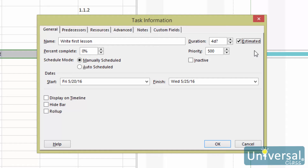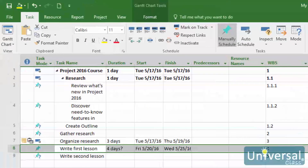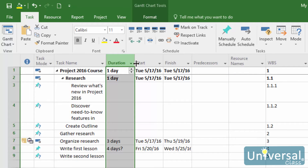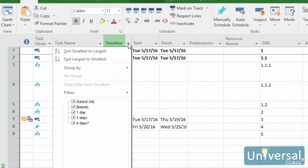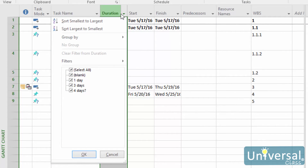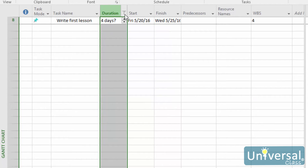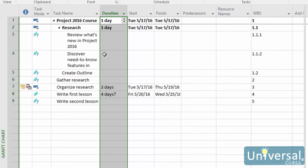Once you've checked the estimated box, you need to apply a filter that will apply to all tasks with estimated durations. Click OK with that box checked. To apply a filter, select the duration column in your task list by clicking on the duration column header once, then clicking the downward arrow to the right of it. All filters are selected by default. To see just the tasks that have estimated durations, only check the box with question marks that follow the duration. To clear the filter, click on the drop down again and then click on clear filter from duration.